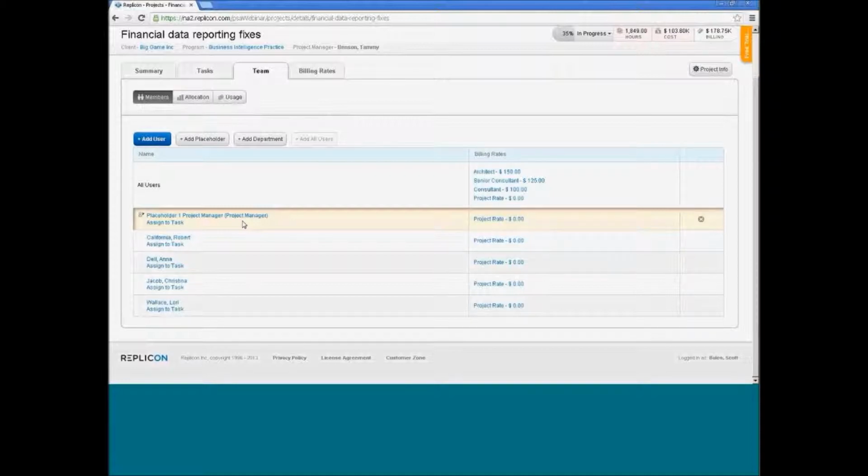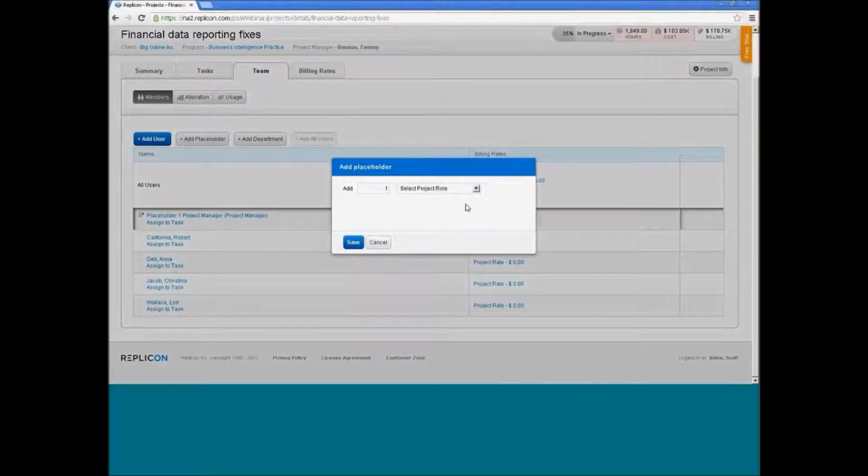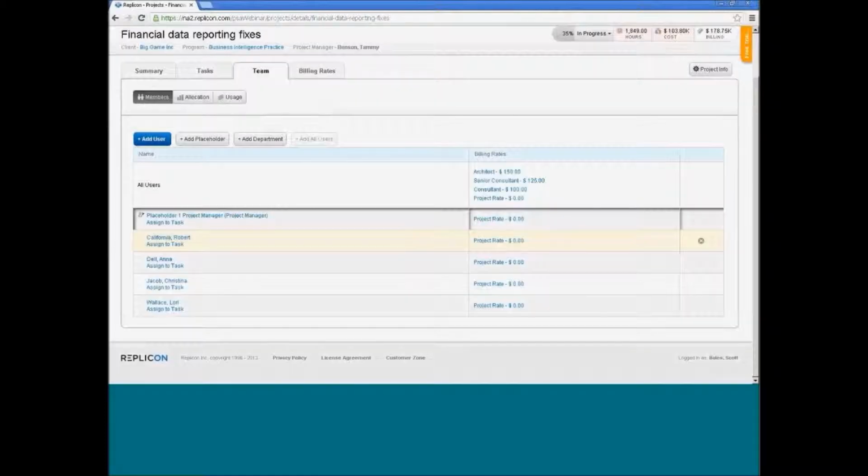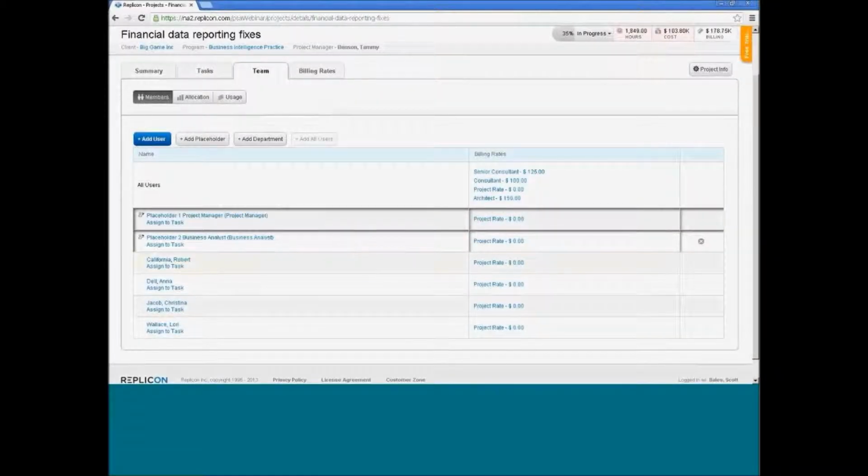What you could do with a placeholder was minimal compared to an actual user, but within our system, what you're going to be able to do is add a placeholder, choose from a selection of roles that apply to that placeholder, associate them to account, and when you would really use this is as a PM planning the types of resources you need, and then maybe having a resource manager go in after the fact. Or maybe it's just a resource that you need to hire, you don't have it on your staff yet, and you need to account for it. That's where we're going to use placeholders.